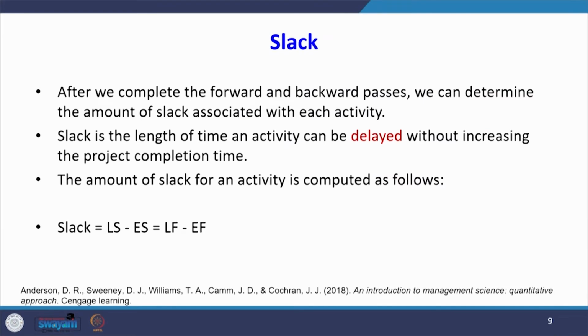Now, I am going to explain an important concept called slack. After we complete the forward and backward passes, we can determine the amount of slack associated with each activity. What is slack? Slack is the length of time an activity can be delayed without increasing the project completion time. The amount of slack for an activity is computed as the latest start time minus the earliest start time, or the latest finish time minus the earliest finish time.